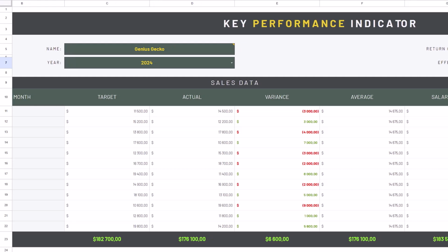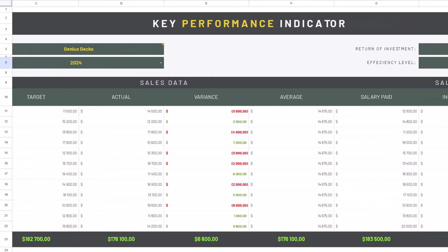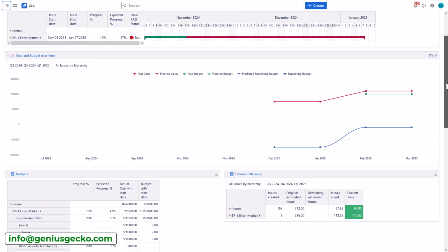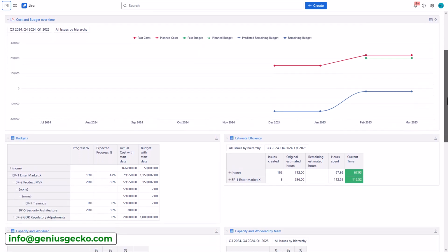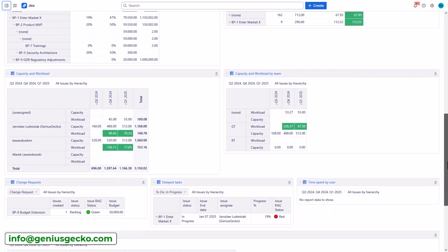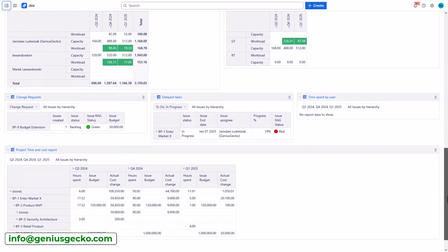For example, implement a standardized weekly report template or dashboard for all projects with clear fields for key metrics. You can also use a PPM tool or dashboard that automatically pulls in data from project schedules and progress updates, generating a portfolio level report without manual compilation.